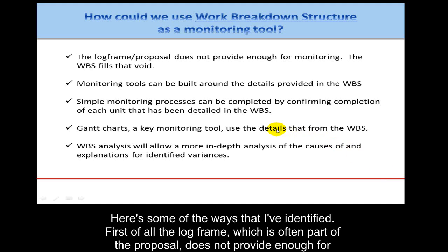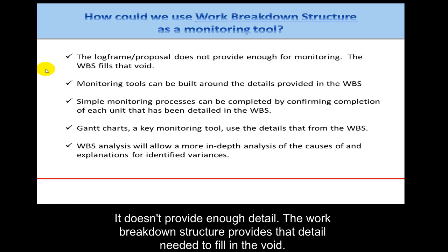Here are some of the ways that I've identified. First of all, the log frame, which is often part of the proposal, does not provide enough for monitoring. It doesn't provide enough detail. The work breakdown structure provides that detail that's needed to fill in the void.